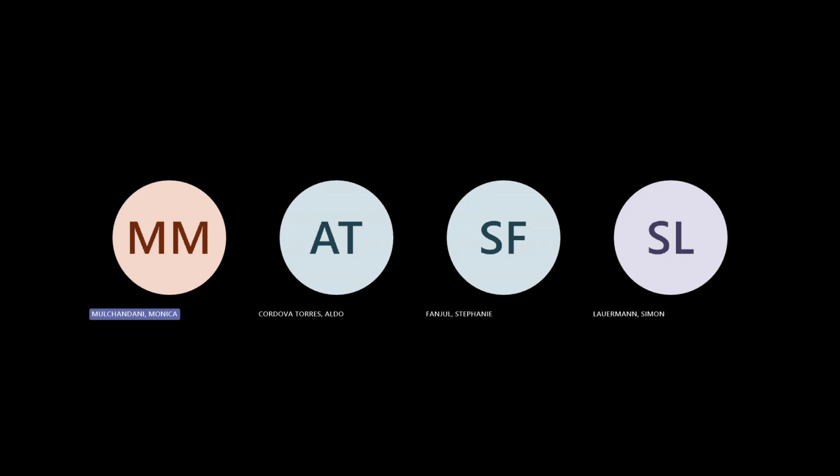And once it's forwarded, it goes to the next department and that initiates a change of status. So basically, PCPS CX stands for ready to forward. It's just coding we have defined, and everybody is so used to it that everybody just talks that way and understands. Then when they do the action of forwarding, that's when they officially hand it over to A&E. The status changes and it goes to A&E, the next department, and that department's first activity is scope.